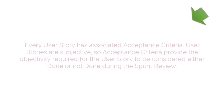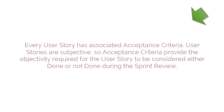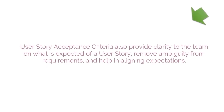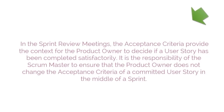Every user story has associated acceptance criteria. User stories are subjective, so acceptance criteria provide the objectivity required for the user story to be considered done or not done during the sprint review. User Story Acceptance Criteria also provide clarity to the team, remove ambiguity from requirements, and help align expectations. It is the responsibility of the Scrum Master to ensure that the product owner does not change the acceptance criteria of a committed user story in the middle of a sprint.